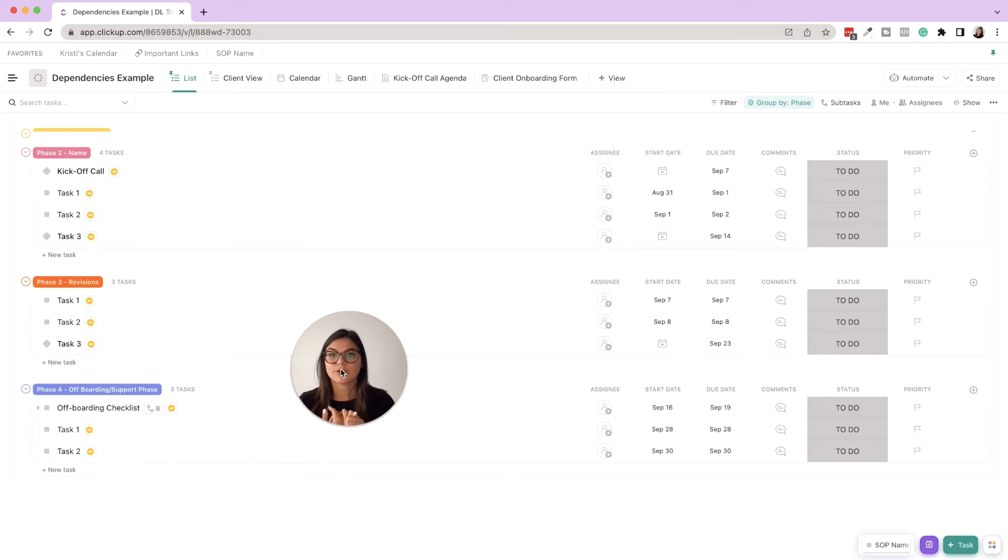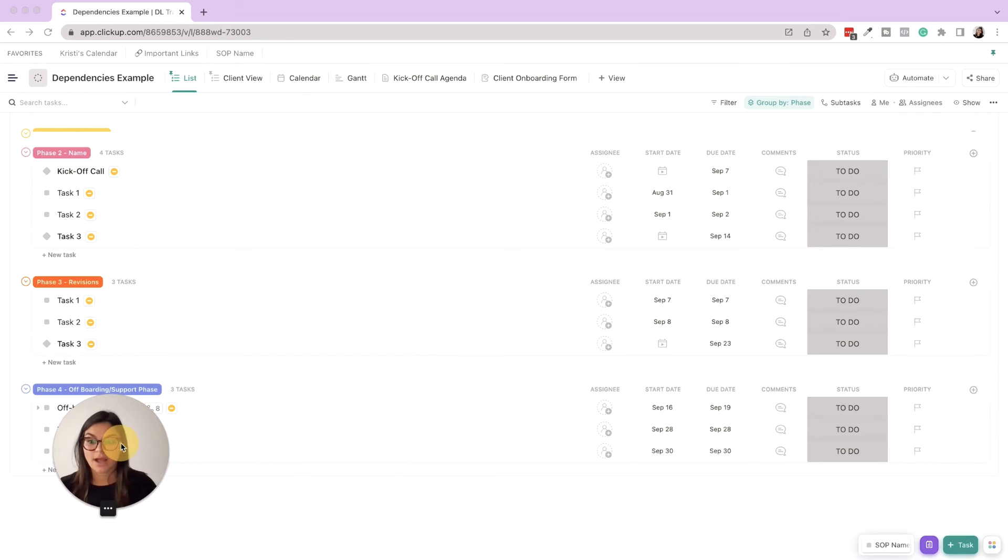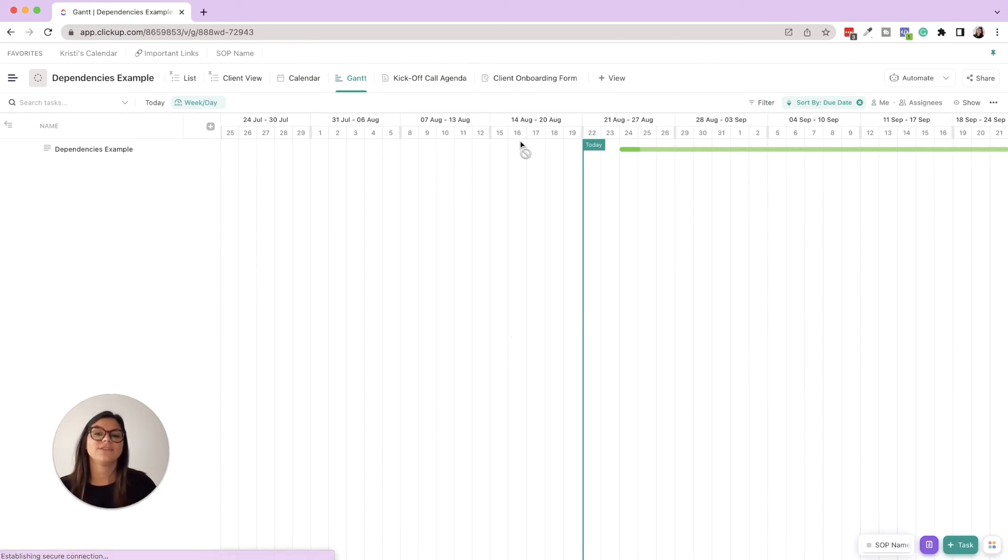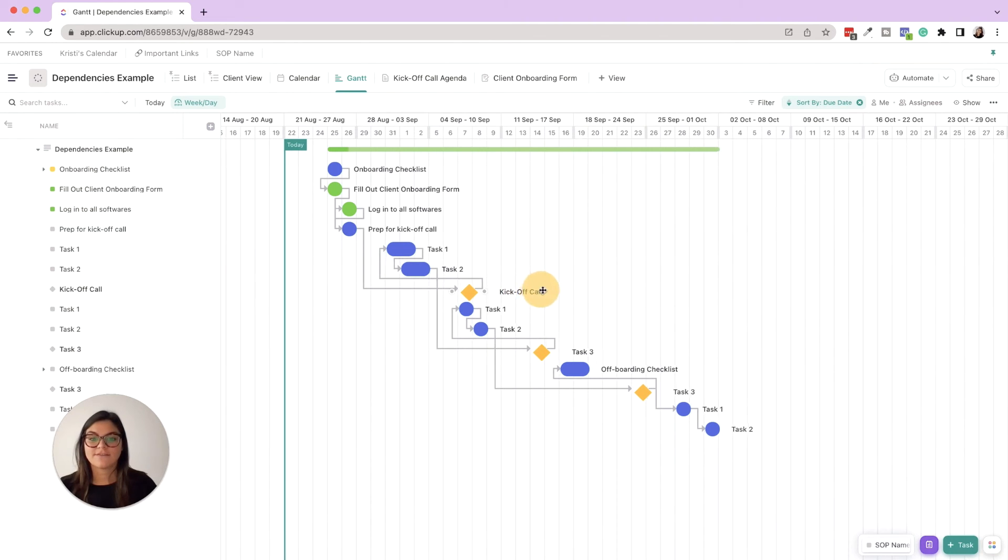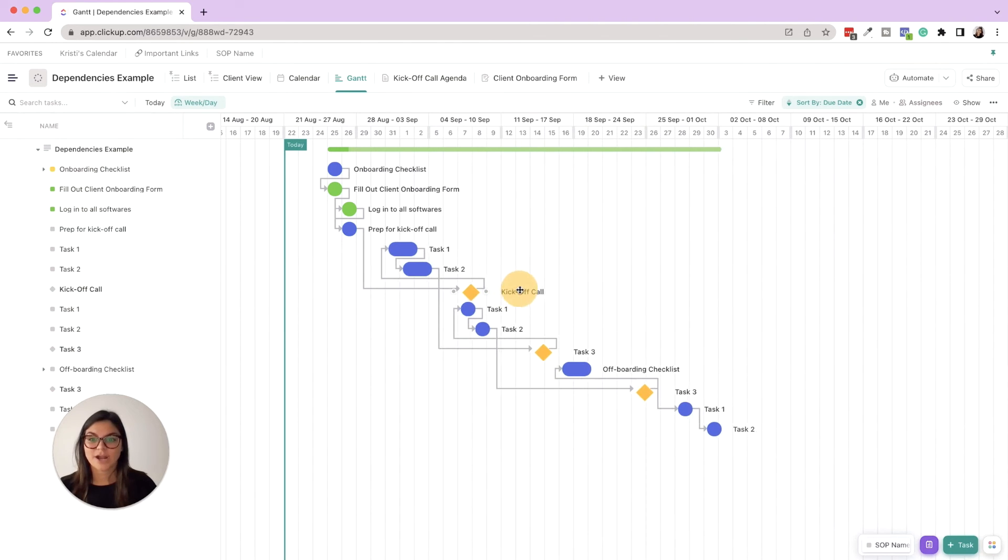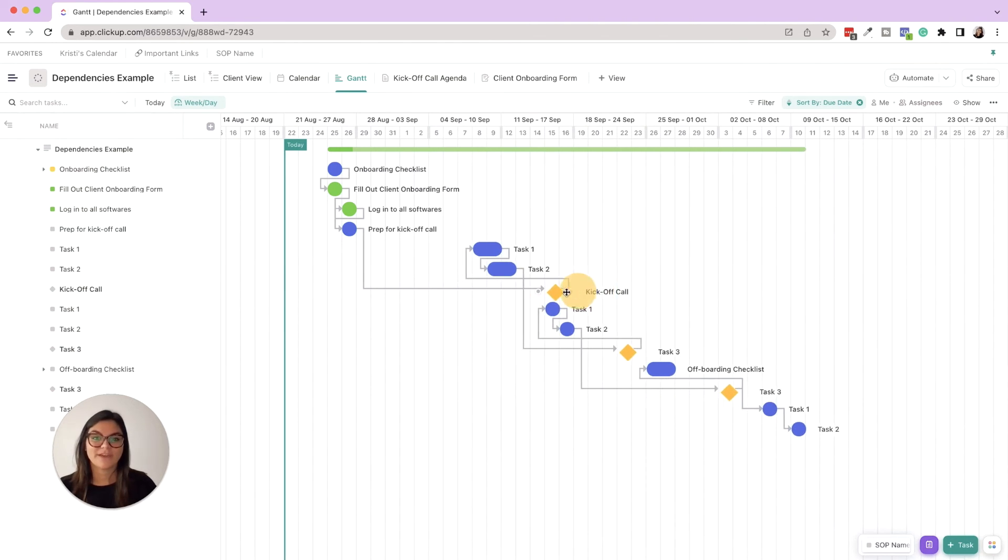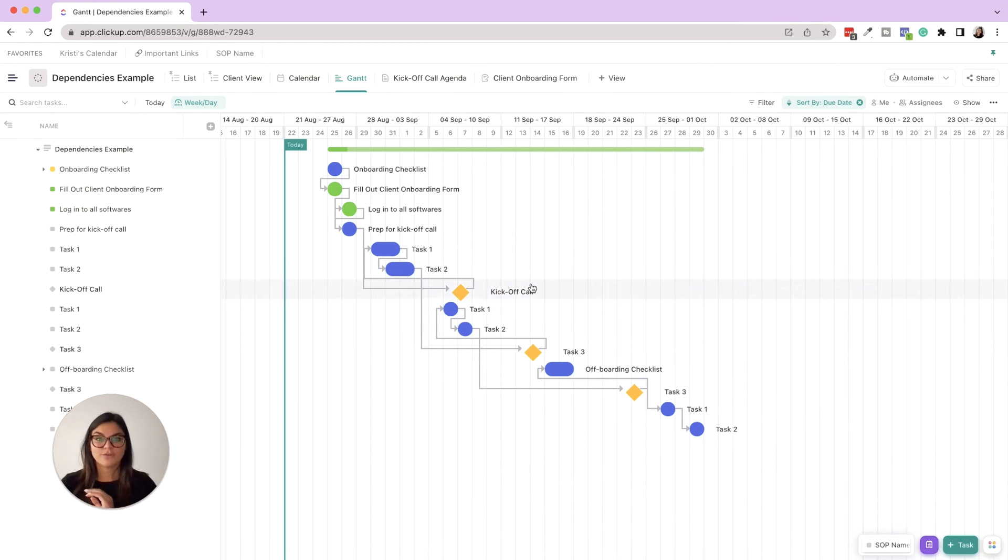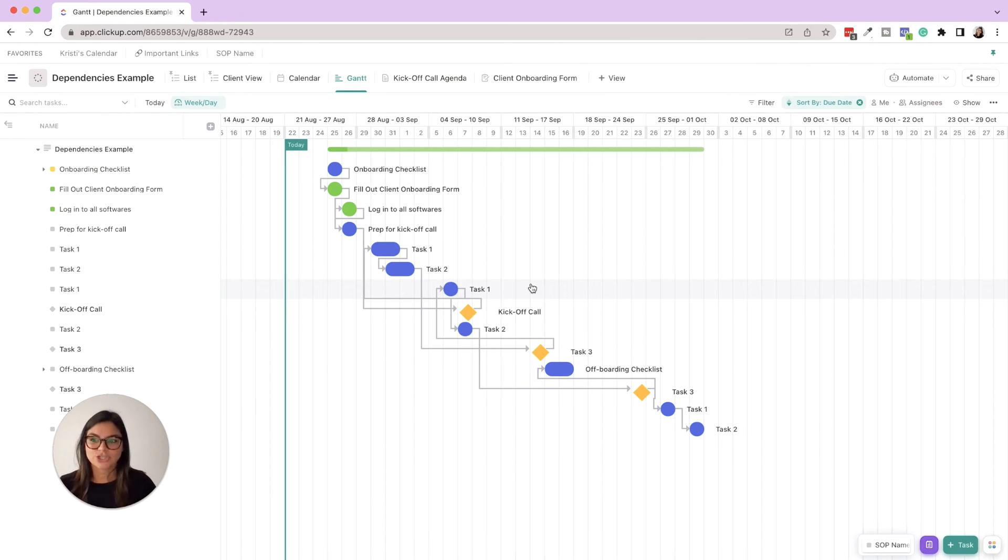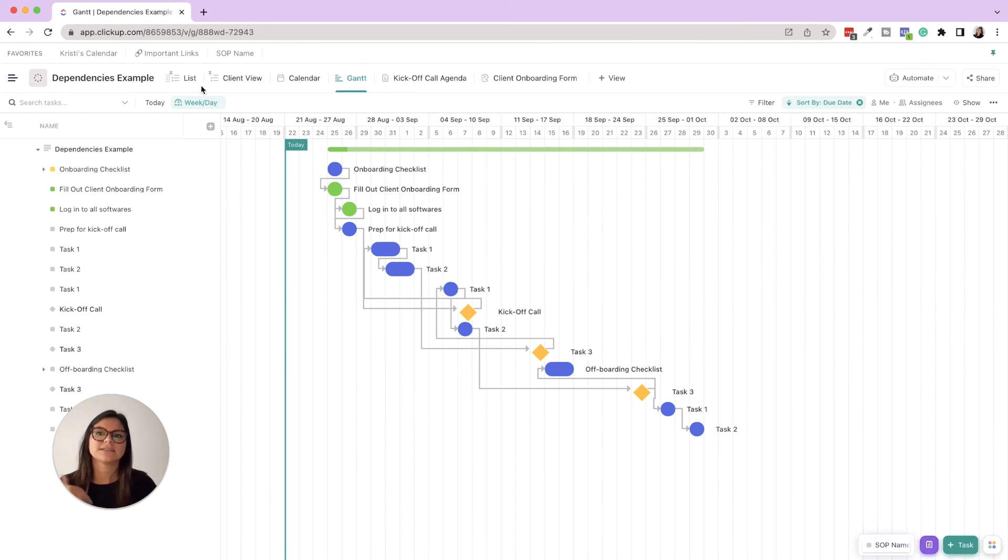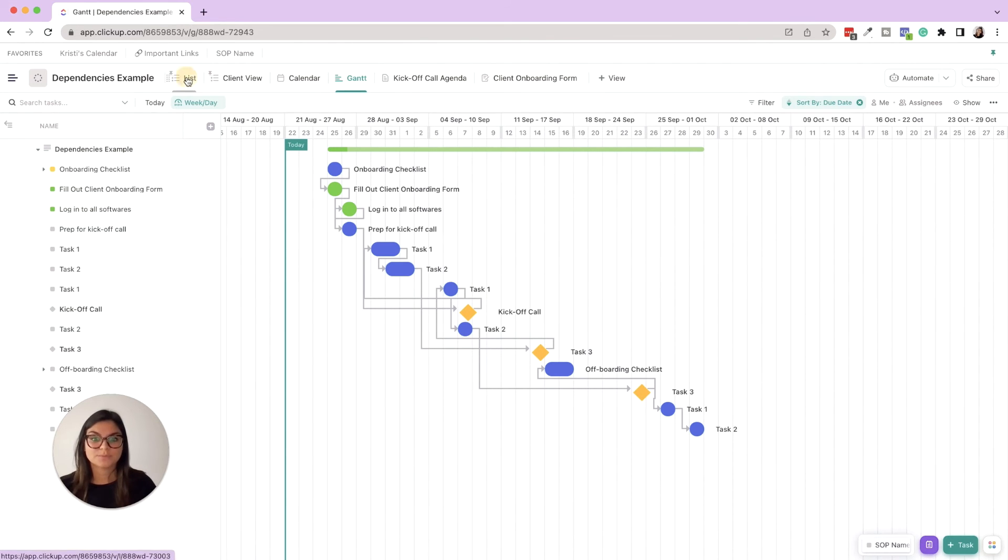It's also great for communication with clients as well because you can say hey, if you are assigned to this review task or this kickoff call, if that's moving, the rest of the project is moving with it. So that's great also for rescheduling projects as things are getting pushed and pushed and pushed - you don't have to manually go in and adjust the due dates. The dependencies will do it for you.